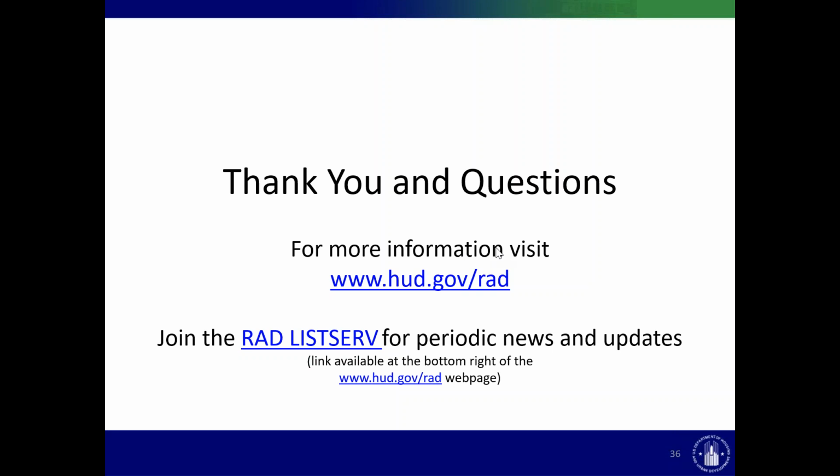Oh, good question. Are you still required to submit for 9% tax credits in the immediate next round? And if tax credits are not awarded, can you keep the CHAP and retry the next round? So thank you, Hillary. We have eliminated the requirement that the PHA has to apply for 9% tax credits in the very next round, and can be more lenient on that front.